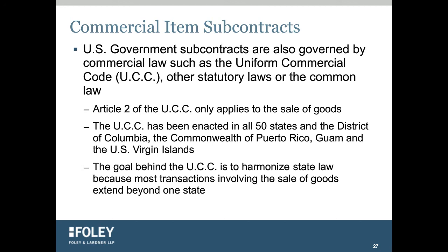Marshall talked about the FAR changes clause. Well, a lot of times in your commercial terms and conditions, there's also a paragraph about changes. And so when your customer's flowing you down the changes clause, it might conflict with the changes language in the commercial terms and conditions. You'll want to be able to read both and reconcile any conflicts up front rather than after the fact when you have an issue.